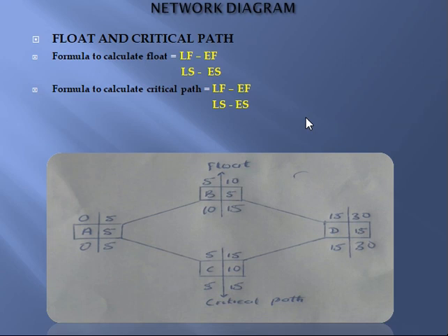You understand? So now this particular place, since you have to wait for this guy after ending on the 10th, you still have 5 days to wait for this guy to finish his own project before you can start this. It means this particular guy carrying out this activity has 5 days of float. So 5 days of freedom. Understand? While he is waiting for this guy to complete his project on the 15th, he can decide to travel, visit his wife, visit his family, and come back on the 14th. And then together they will carry out this particular project. So that's what the float is talking about.